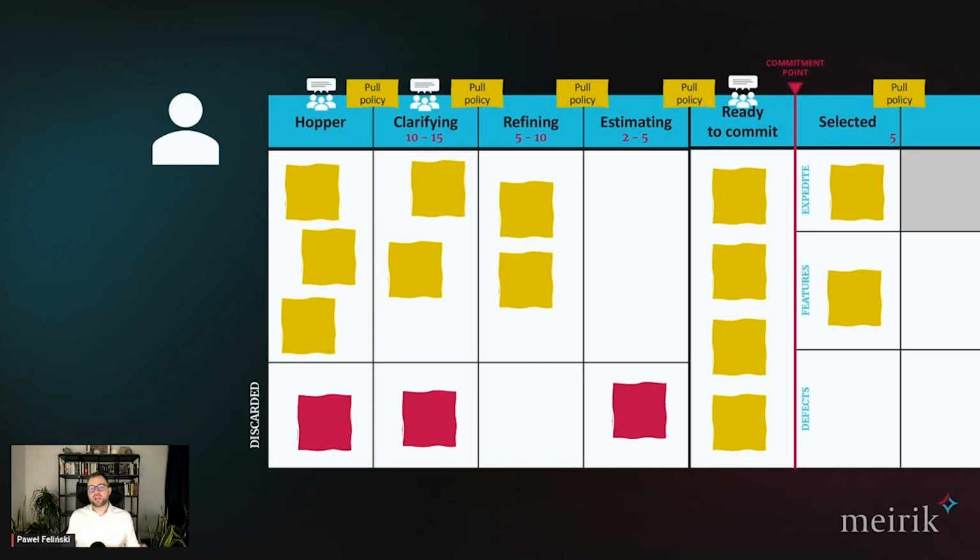However, in order to clarify the requirements and help refine the requirements by the Scrum team later on, a bigger process was established because that was a pretty sophisticated piece of engineering. The Upstream Kanban had roughly 4, maybe 5 columns, and it ended with a column not named ready to commit, but named the product backlog, as you would expect in the Scrum framework. So actually using Upstream Kanban standalone without the downstream part is absolutely okay, actually very helpful.